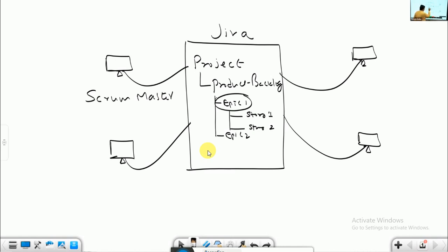Admin should be able to define and manage branches of the Primus Bank, that is the epic. Various functionalities belong to this requirement. Admin should be able to create a new branch. Admin should be able to update the existing branch details. Admin should be able to delete unwanted Primus Bank branches. These are called user stories, functionalities belonging to a major requirement.